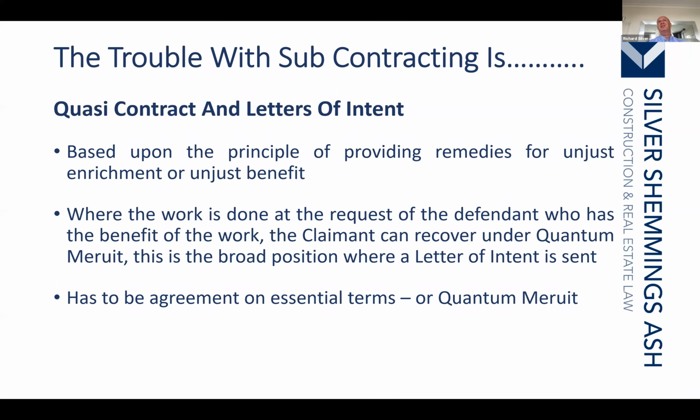It is my belief that in most circumstances, it is far more beneficial to be under a letter of intent or in an area of quasi-contract than it is to be under a contract. Because rather than being paid in accordance with your tender, you are paid a reasonable amount. And in some circumstances, that can be, in effect, cost plus.